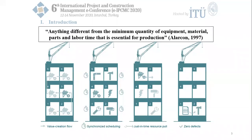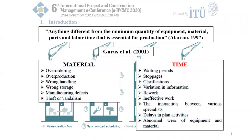In lean philosophy, waste is defined as anything different from the minimum quantity of equipment, material, parts, and labor time that is essential for production. Time-related wastes identified in the construction industry include waiting periods, stoppages, clarifications, variation in information, rework, ineffective work, the interaction between various specialists, delays in planned activities, and abnormal wear of equipment and material.